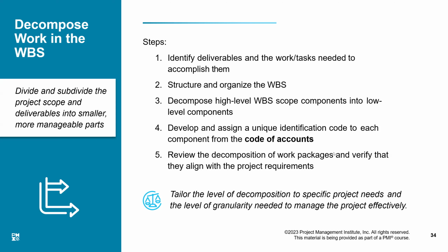Review the decomposition of work packages and verify that they align with the project requirements. That is very important. Whatever your requirements were in the scope, ensure that these work packages address them all. If you find that any one of the requirements is not yet covered, you have to add it into the work breakdown structure because it should be complete. And in future, if any new requirements get added, you will have to amend the work breakdown structure, and a change request has to be raised for doing that.